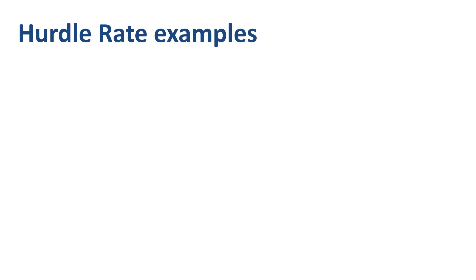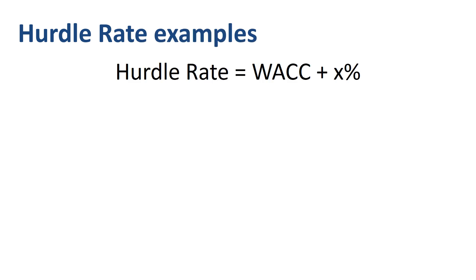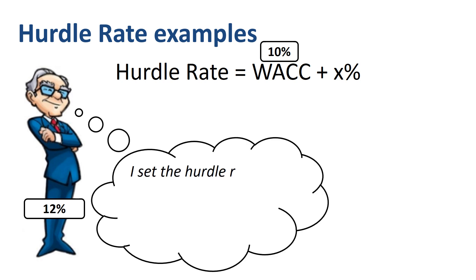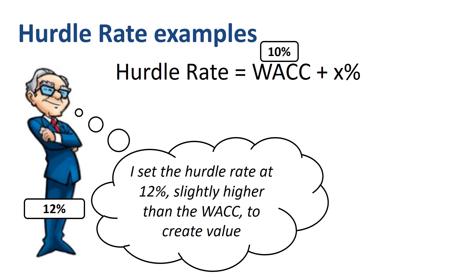Here are two examples of approaches that the CFO might take. The hurdle rate tends to be set at the WACC plus a couple of percentage points. Let's say the WACC for the company in this example is 10%. The CFO in blue sets the hurdle rate at 12% — WACC plus 2 percentage points — to create value for the company. He only accepts project proposals if they promise an IRR of 12% or more; 11% would not be good enough, as it's higher than the WACC but lower than the hurdle rate.